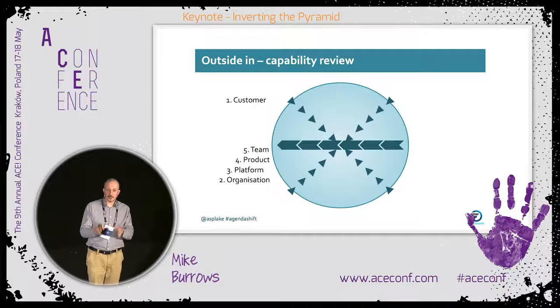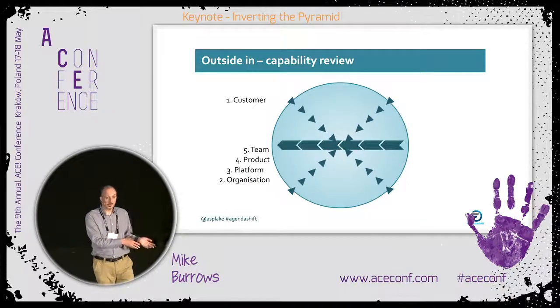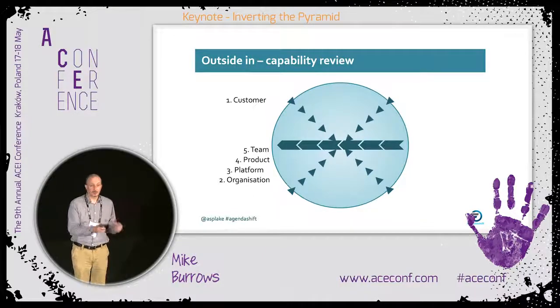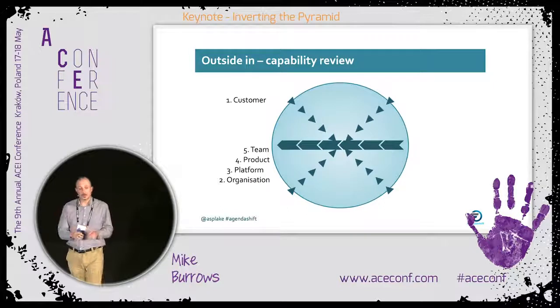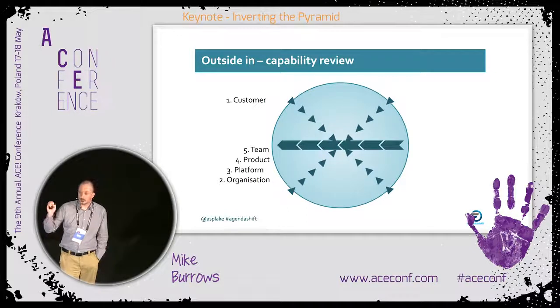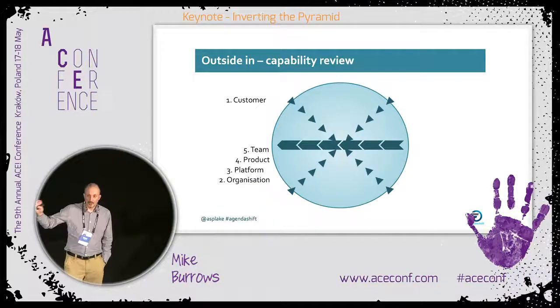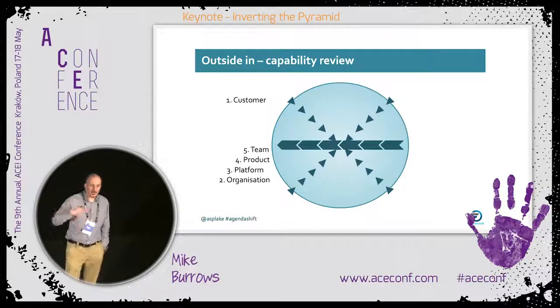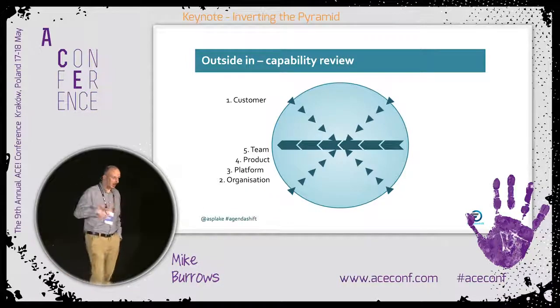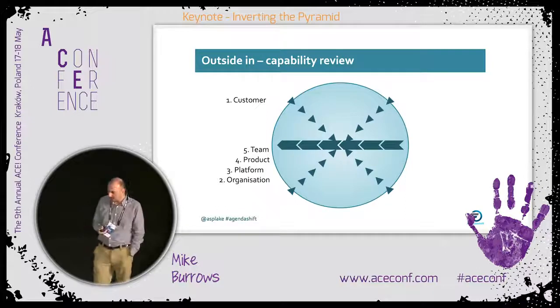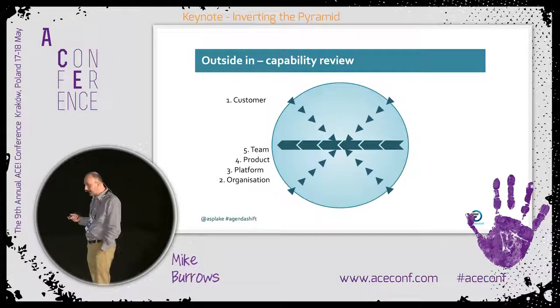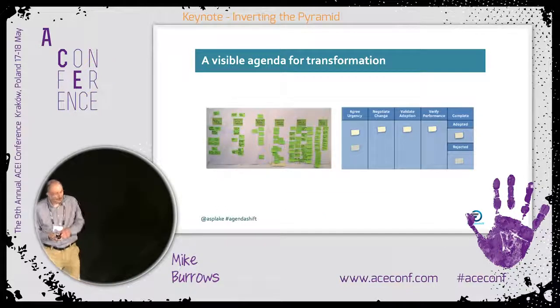So you're not actually reflecting on what you learnt since the last time, and you're not checking that the experiments that you completed last time really have delivered the results that you hoped. You are setting yourselves up for scrutinizing the work that you're currently talking about the next time, and so on. So you keep that agenda moving, meeting by meeting. So that's really outside in and left to right together.